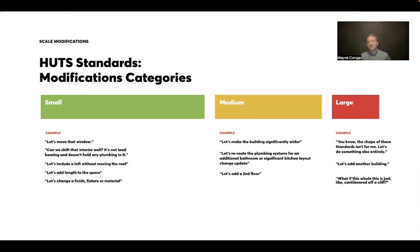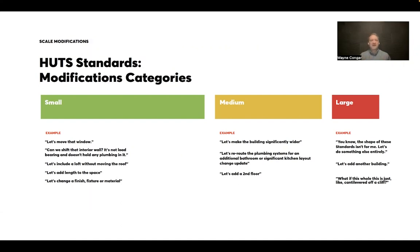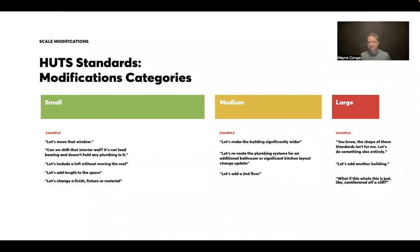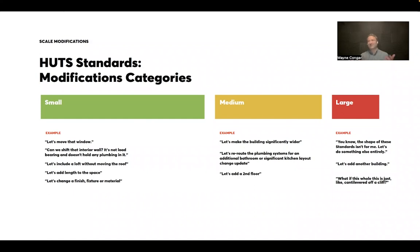Another would be, great, love the standard, but now I just want to add a whole other building. There's some other custom building, whatever it might be. And so there's certainly going to be a scope change there and something that we wouldn't have accounted for up front, but now we need to address kind of midstream in the project. And last is sort of like wild siting conditions. Hey, this all looks good. But what if this whole thing was just like cantilevered off a cliff? It's like, love it, but we are absolutely going to have some consultants come in. We're definitely going to have some structural engineering in play. And this is going to be categorized as sort of a large modification and likely sort of out of scope.